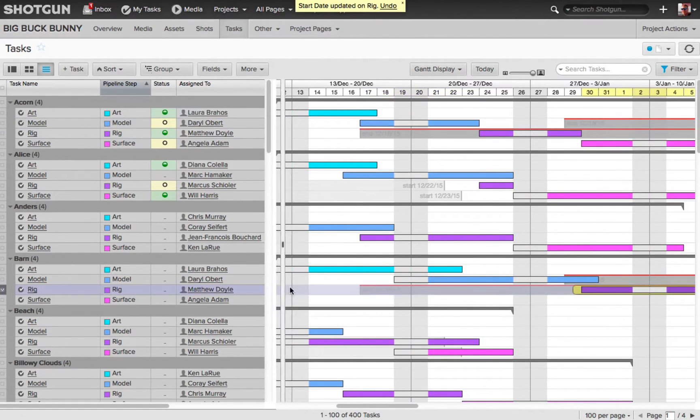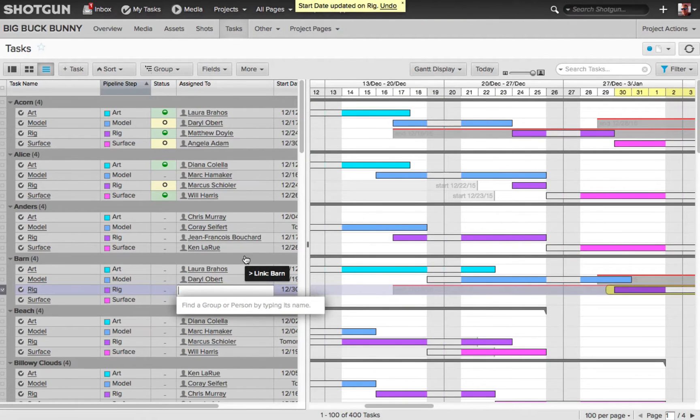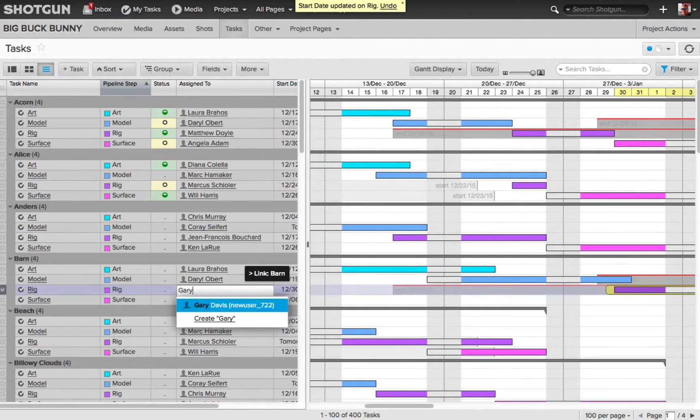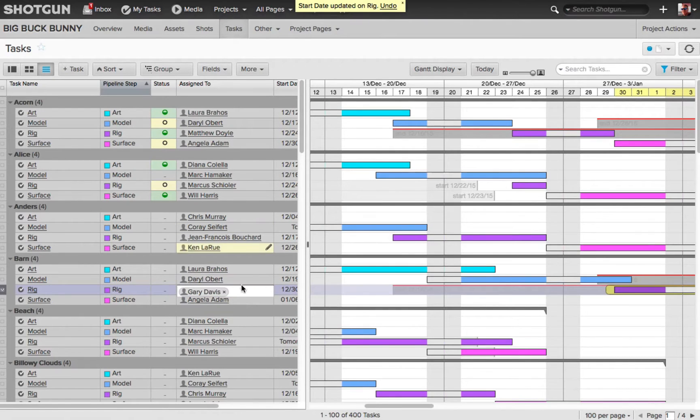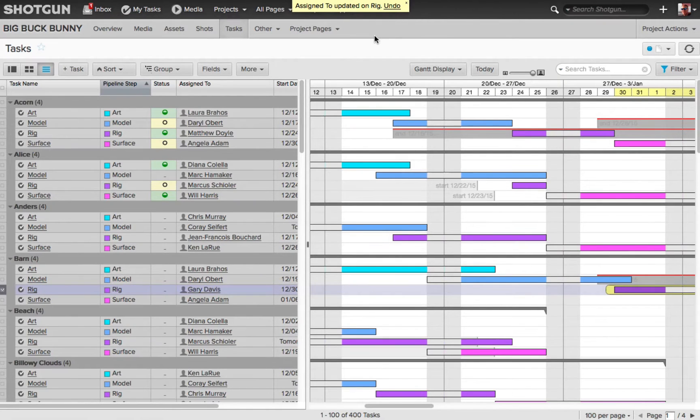So now I can easily come in here and edit this and say, okay, well let's take Matthew off of that task. I know Gary is free at that time, so let's add Gary. And now I no longer have a conflict of Matthew being on vacation when I needed the rigging done.